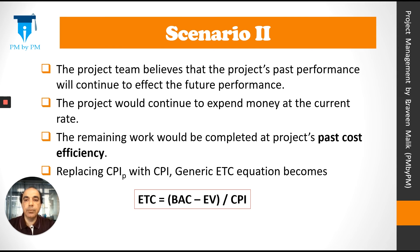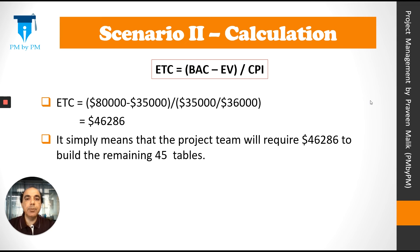Scenario 2: the project team believes the project's past performance will continue to affect future performance — the project will continue to spend money at the current rate. The remaining work would be completed at the project's past cost efficiency. Replacing CPI_P with CPI, the formula becomes ETC equals (BAC minus EV) divided by CPI. For our example project, after calculation, ETC comes out to be $46,286 — meaning the team will require $46,286 to build the remaining 45 tables.